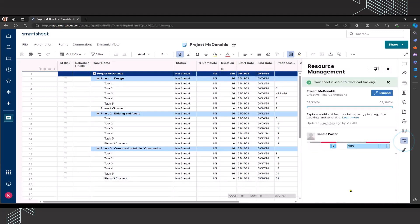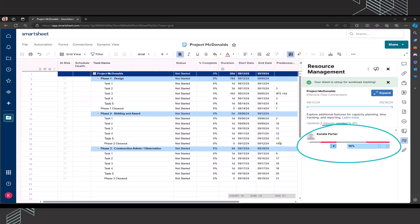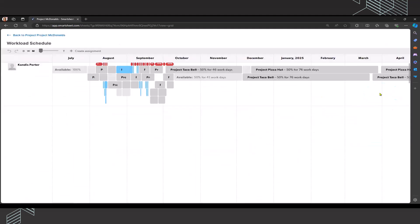You could see right off the bat that there's over allocation because there are some red stints that are showing up on this bar. If I want to dig a little bit deeper, I'm going to click on the expand. This is not only going to show project McDonald's, it's also going to show the other projects that I'm assigned to.